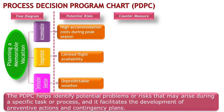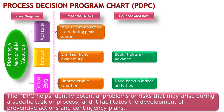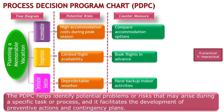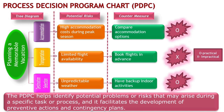To counter these risks, we take specific actions. For unpredictable weather, we may research the climate of the destination and plan alternative indoor activities. To address limited flight availability, we book flights well in advance to secure desired dates and times. For high accommodation costs during peak season, we can compare prices, explore alternative lodging options, and potentially adjust travel dates. By using the PDPC, we evaluate each risk and determine the practicality of the countermeasure, using O to indicate practical solutions and X to represent untractable ones.